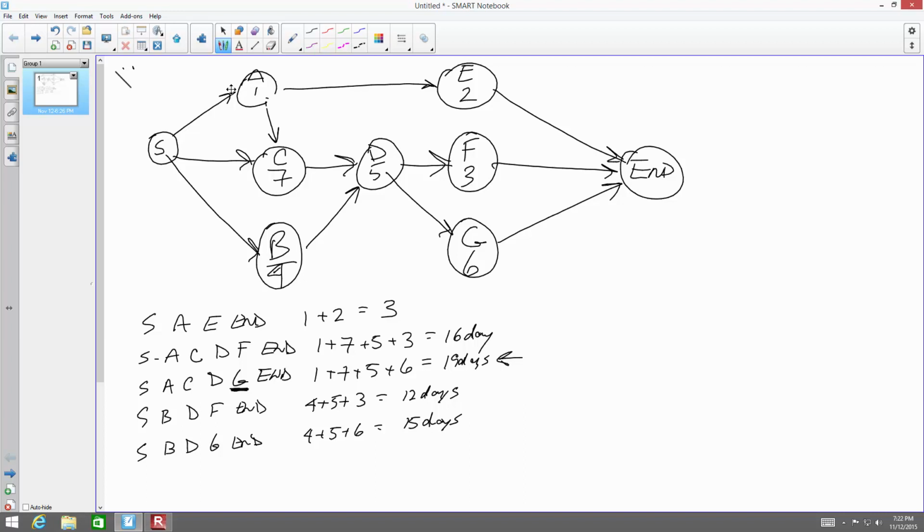The answer is billing for whatever changes you had to do to it. It's illegal to bill two separate people for the same work. Even though that person abandoned the job, you've already done it and been compensated for it, so you can't go and charge somebody else for the same work.